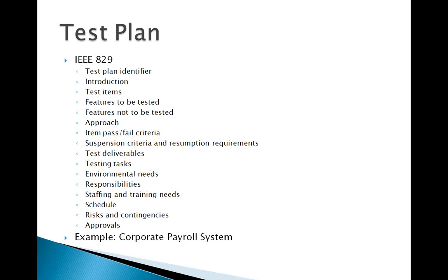And the other fallout of this is that the test engineers, when they start to plan out their execution, can list down these combinations, and then plan out for, let's say, 1 month, 2 months, 3 months, how much it will take for them to do one cycle, then repeat that cycle, and they have a clear-cut picture of where this project is headed for the next 2 months or 3 months, or sometimes even for 1 year.